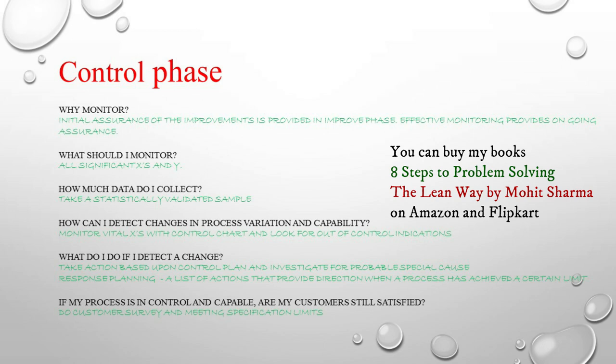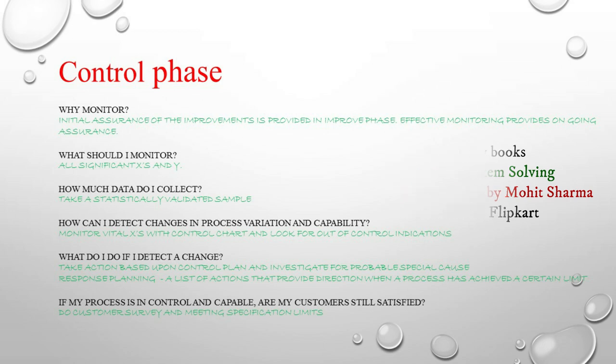How much data should we collect every day? We need to take statistically validated samples and collect data based on that. The next question is: how can I detect changes in process variation and capability? When we monitor the vital X's with control charts and see anything going out of control, that is when we can identify changes in process variation and capability.